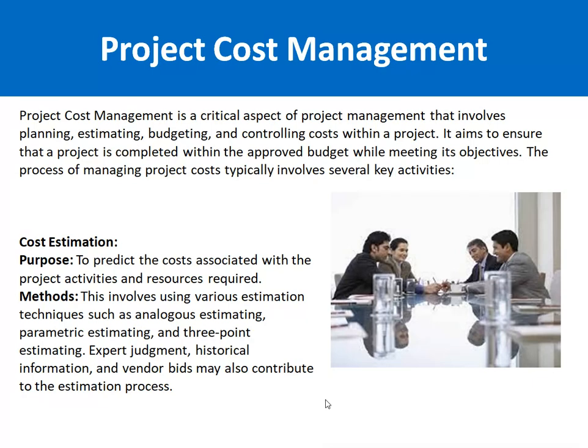Expert judgment means that you discuss with an expert, like any domain expert who has experience about this product domain. So based on that you get some information and do the estimation. Also, you can use historical information, like lessons learned documents. For example, some historical documents are available, like cost management documents, so based on that you can do the estimation.